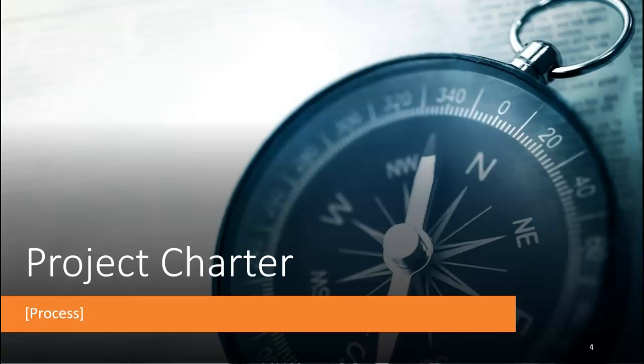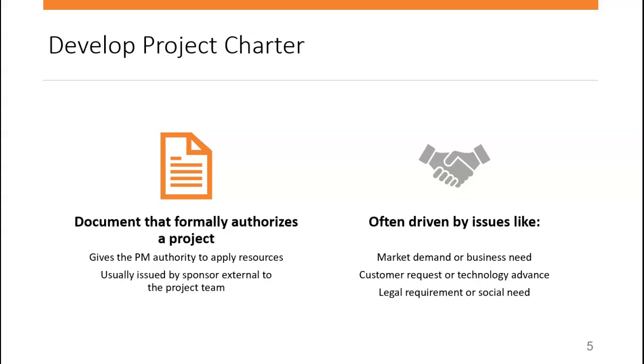And so this is how your project is going to be carried out, who the key stakeholders are, the high-level ones. It is a crucial ingredient in planning the project because it's used throughout the project lifecycle. Now, the project charter formally outlines the project in the organization, and it covers the scope of what the project will achieve, the milestones, a high-level budget, possible high-level risks, and what is success criteria.